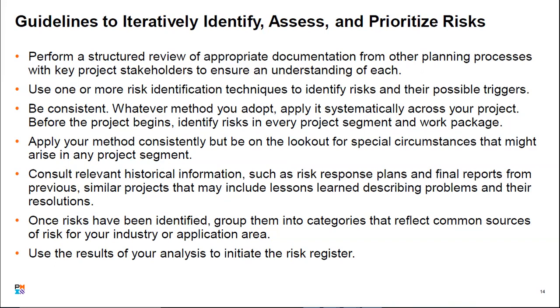Three is to be consistent. Whatever method you adopt, apply it systematically across your project. Before your project begins, identify risks in every project segment and work package. Apply your method consistently, but be on the lookout for special circumstances that might arise in any project segment.